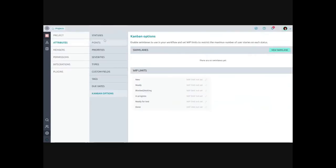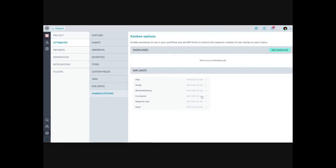Under kanban options in the attributes, you can set work-in-progress limits and create swim lanes. You set the number of user stories allowed for a given column on a per-swim-lane basis. For example, you might not want limits for 'new,' 'ready,' or 'blocked,' but you might want a limit on 'in progress' and 'ready for test' to ensure work actually flows all the way through to completion rather than having a bunch of half-started things.